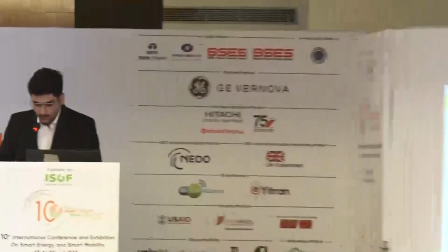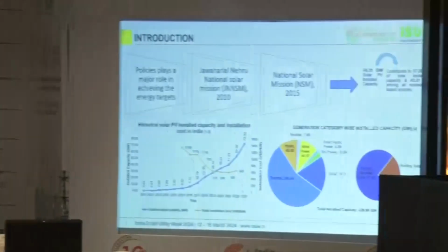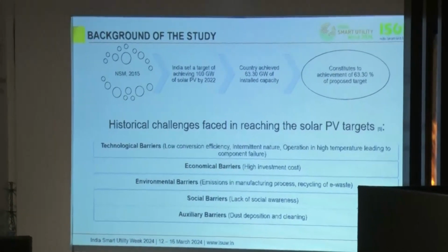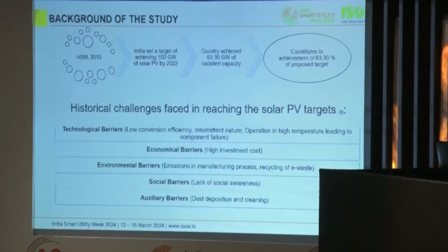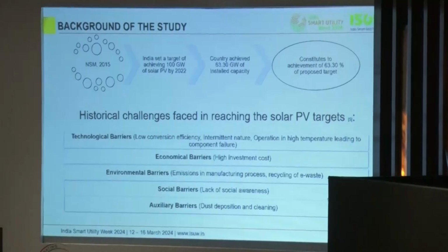Okay, so you are talking about the capital cost of solar photovoltaic. So I will tell you, the current capital cost of solar photovoltaic in the country is $640 per kilowatt. So according to that, for 1 megawatt, it is multiplied by 1,000. So it's almost 640,000 US dollars per megawatt.